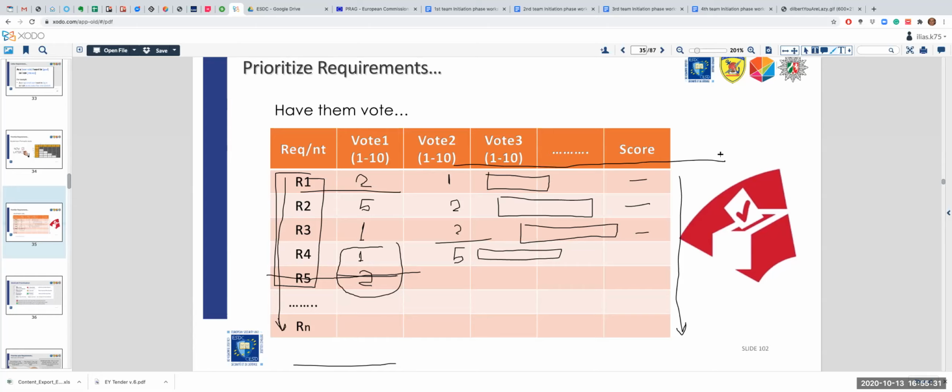Time chart. This is time. And the size of this represents the duration. That means that I will first have to schedule my requirements, do my Gantt chart, define the relationship between the requirements, and then see where my deadline is. And then I will deliver everything that falls within my deadline. Sorry, boss, but within this available time, I can only deliver that, because my estimates are not inflated, because I use the metal plate with the metal pole as a negotiation tool, the triple.